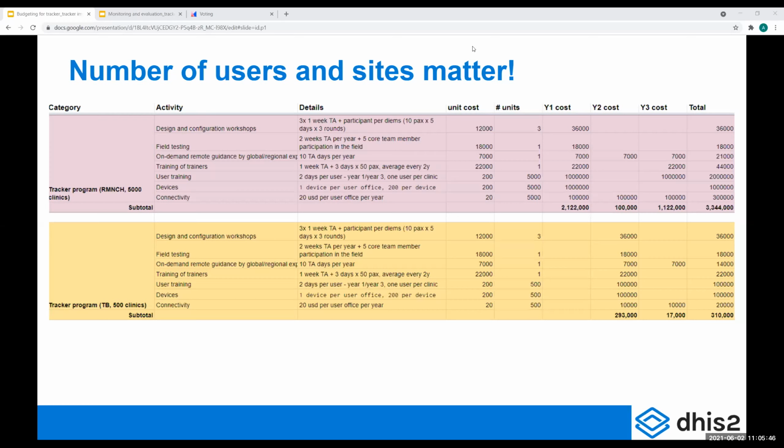So if you need to deal with very sensitive information, you might comply with the law better if you're on premises. If you're going to go on the cloud, maybe you need to do a further analysis of where this data is being kept, if they're following the standards. As an example, in Europe, if we're dealing with patient data, we need to have the servers in Europe because of the GDPR. So you need to look at this locally. But in terms of physical specifications of the server and the connectivity, premises will likely be cheaper, but you might lose this possibility of scaling up in the future.